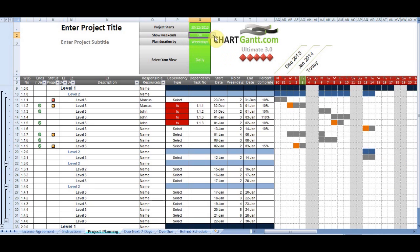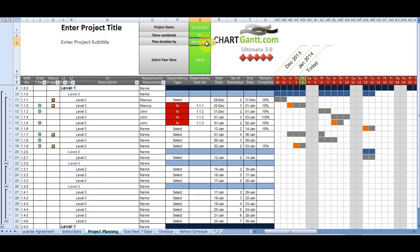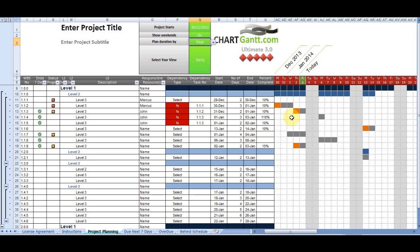We can view weekends. We can turn weekends off. And that looks like that. We can plan in weekdays or in days. And you'll see that has an immediate impact on the schedule. Weekdays, there are five days in a week. Days, there are seven days in a week.